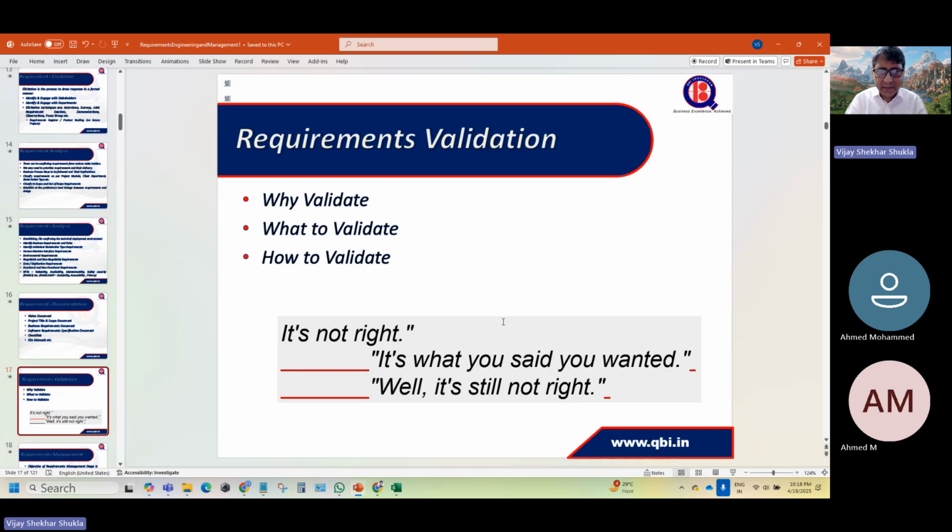How does this validation happen? This validation happens from time to time, and also in the form of a formal document. For example, when we prepare a functional requirement document for a given phase, the client has to sign the full document, basically approve it. Having said that, we will not wait another 3 months to present him the full document. We will share part outputs with him from time to time so that he goes through the outputs and approves them.